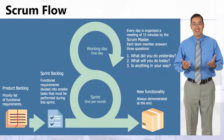Here's the Scrum flow specifically. Coming from the product backlog — which holds the prioritized list of all requirements — items are added to the functional requirements and divided into smaller tasks that must be performed during a sprint. A sprint can be one to four weeks or once per month, depending on the type of project you're working on.